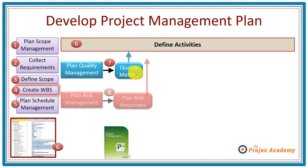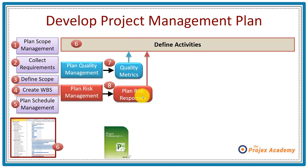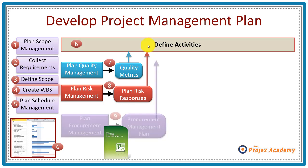What about plan risk management? That, along with plan risk responses, falls under the planning group. The point — not shown clearly in the PMBOK guide, although it is in the sixth edition — is that having planned the risk responses, you then need to implement them. So planning risk responses means they need to be included as activities and resources within your plan, causing extra activities to be added.